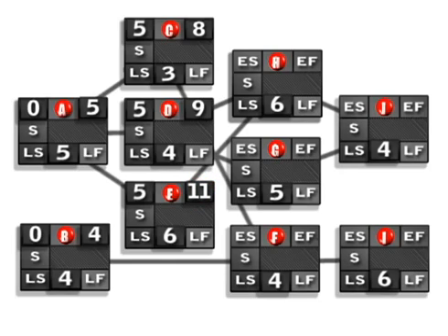Well, now we get into a little bit of a dilemma because we see all of these arrows going all different directions, so we sort it out. Okay, for activity F, right here, we have 2 activities that feed into it, C and B. We have to make a choice. You see that we have an early finish of 8 for activity C and an early finish of 4 for activity B. Remember, by definition, all of the predecessor activities have to be complete before the new activity can begin. That means that we have to choose the highest of the 2. So we're going to choose 8 for our early start for activity F.